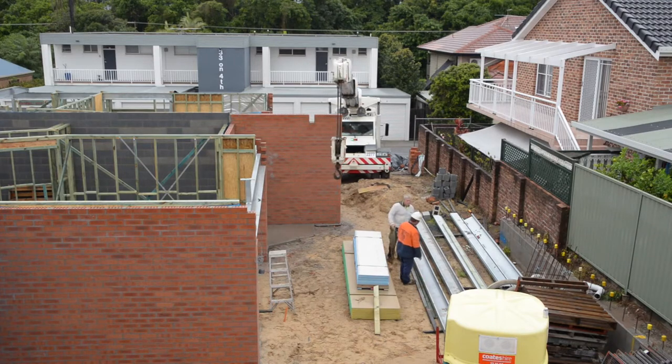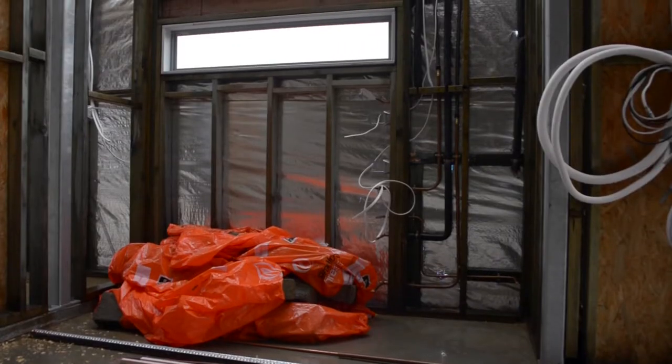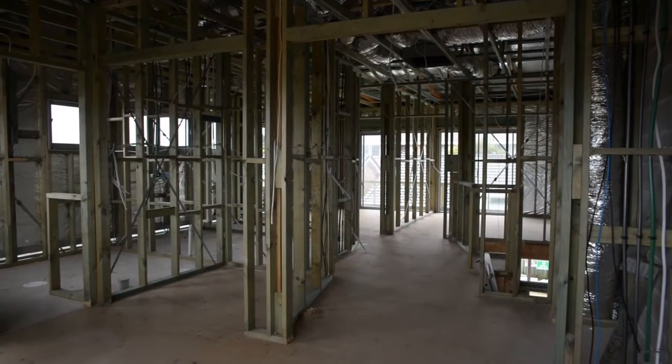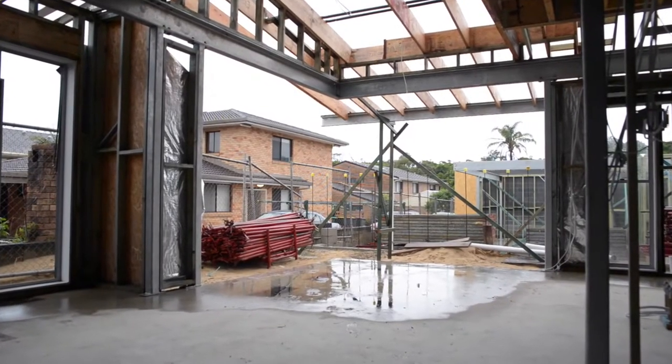It does. Now, this part of the development is at lock-up almost. Almost. The doors are actually sitting at the joinery shop ready to be delivered. So electricians are putting wiring in as we talk. The plumbers have nearly finished their gig, and by 2 weeks' time we should have gyprock on and the front door on. So October deadline, are we going to meet it? I hope so. I love that. That's really affirmative. Well, we're trying very hard. If this weather keeps up, no, but other than that, we've got a pretty good chance of making it.